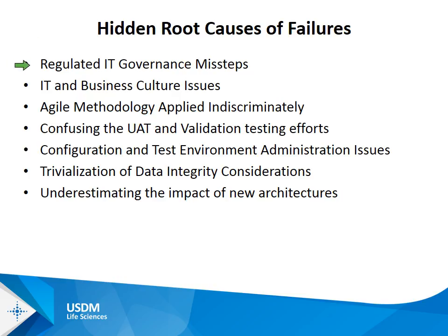So again, the root cause is often IT governance. IT governance is where the project plans ultimately are defined. They take their marching orders from IT governance, the priorities of projects, the resourcing of projects, the dates the projects are supposed to meet, which are driven by business requirements and business needs, but often are lacking the insight necessary to the fact that these are regulated systems. In fact, many of the times, these dates are set without any context in terms of whether this is going to be a regulated, validated system or not.